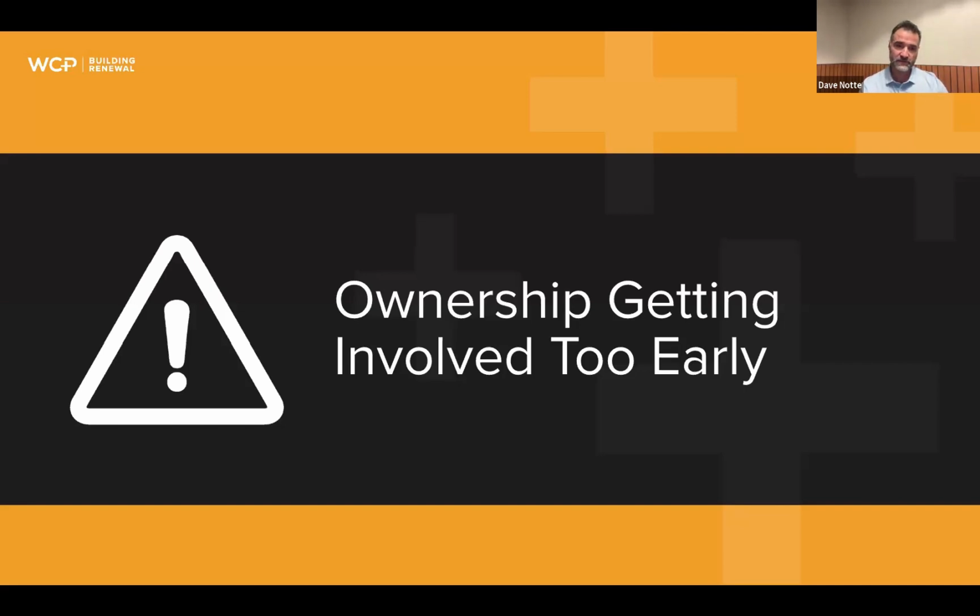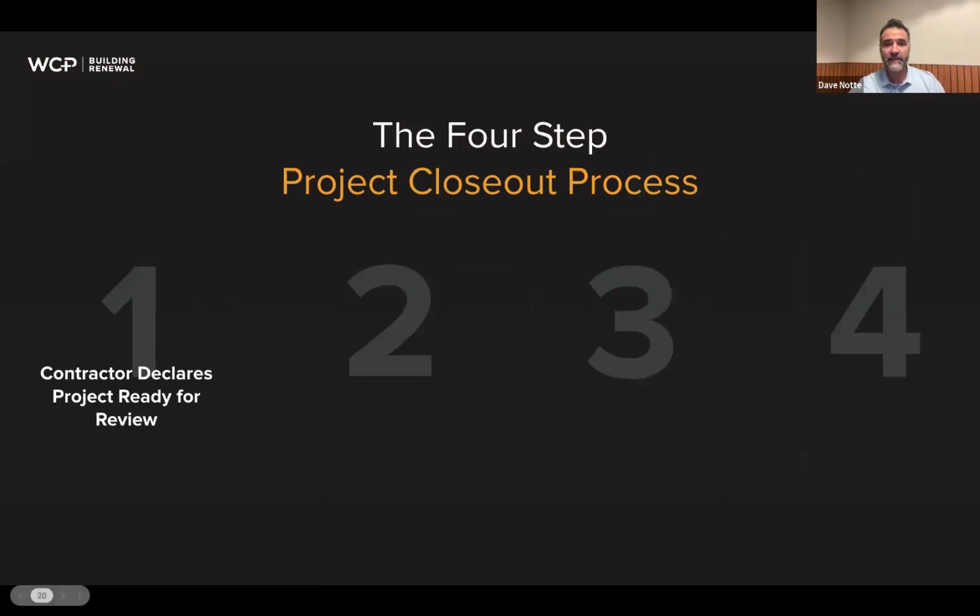And this gets us to the first step of an effective job close, and that is the contractor declares that the project is substantially complete. Look, you've done all the work in doing a proper project tender meeting, like Heinrich discussed. You've done a pre-production meeting to kick the job off properly. You've hired a professional. Let them do their job.